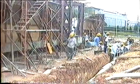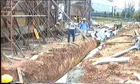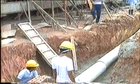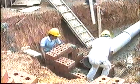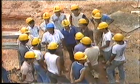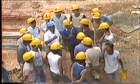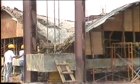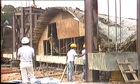While waiting for the concrete to cure, members of our team are busy constructing the drainage works. The precast channels are carefully laid and aligned. An inspection chamber for a drainage line is constructed. Before we remove the props and strike the formwork, we are briefed on the dismantling procedures. This part of the work has to be meticulously carried out to avoid damage to the hardened concrete.